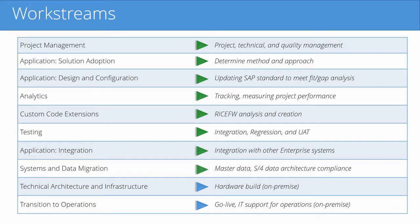Systems and data migration towards the end is where master data and the data architecture are set up so that S4 HANA can work correctly, either on the cloud or at the on-premise installation. Technical architecture and infrastructure would be the hardware build, which would be necessary for on-premise installations. This step would not be necessary for the cloud, as that would be taken care of by the hosting partner. And finally, the transition to operation would be the go-live and IT support for operations, which is primarily an on-premise task.